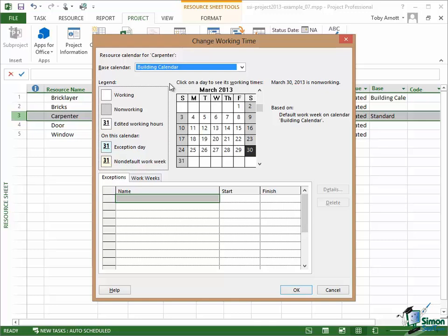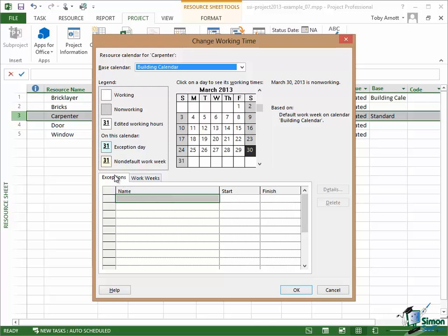Now again, I should point out here that although the resource calendar for carpenter has as its base calendar the building calendar, if I wanted to put some exceptions for the carpenter, I could do them here. The exceptions for working time for carpenter, for instance, would be things like the carpenter's vacations. If a carpenter is going to take a couple of weeks off, I can actually record that as an exception here. If the carpenter, for instance, has to go to the dentist one day, I can actually put a two or three hour exception in here. So you can define exceptions for individual resources.